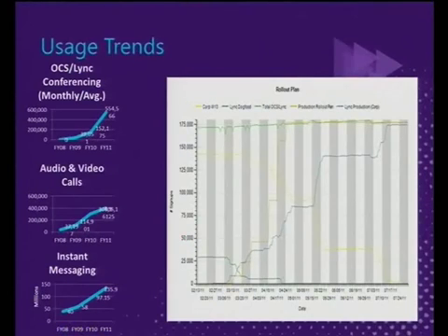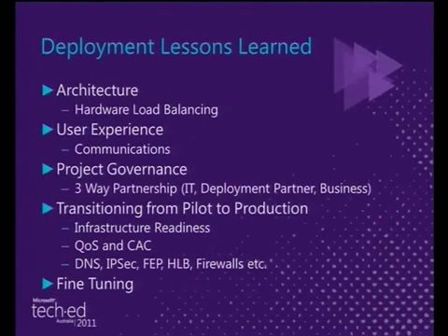You can see this rollout plan here is actually MSIT, and you can see how all deployments come in bursts and then steady state while the next site gets prepared, another burst, steady state, and what have you. That would be typical in most customer deployments.